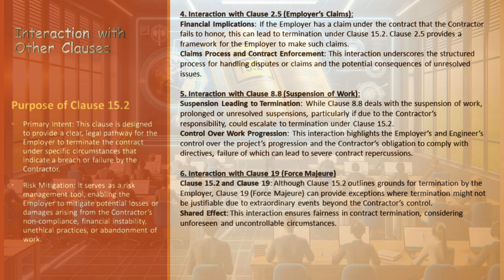Interaction with Clause 2.5 — Employer's Claims: If the contractor neglects to fulfill a claim made by the employer under the contract as outlined in Clause 2.5, it can trigger termination as per Clause 15.2. This interaction emphasizes a structured approach to dispute resolution and the potential consequences of unresolved contractual disputes. Interaction with Clause 8.8 — Suspension of Work: While Clause 8.8 concerns the suspension of work, ongoing suspensions attributable to the contractor can escalate to termination under Clause 15.2, highlighting the contractor's duty to comply with directives.